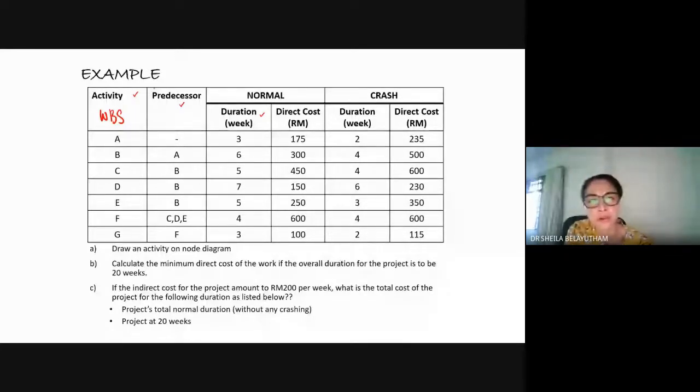Okay, so through WBS. And WBS does not show the relationship. Okay, so your relationship is shown by you placing it based on the predecessor, successor, based on the different relationship. Okay, so once you have that, you can estimate your duration based on the resources you have in hand.